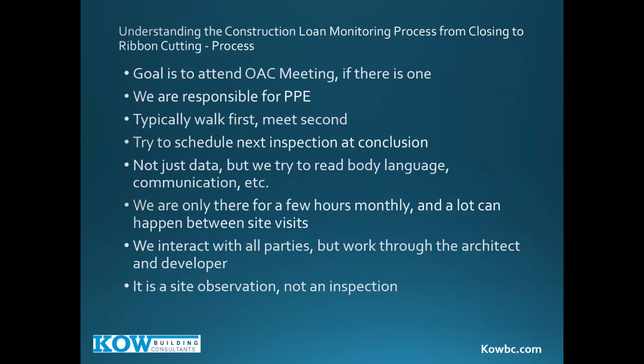But you're waiting for the building department to show up and approve of the rebar and the foundation walls. That's an inspection. Because until that inspector shows up and says, okay, your foundation rebar is approved, you can't pour that concrete. That's not us. That's a very real part of the job. But where we live is in the observation.